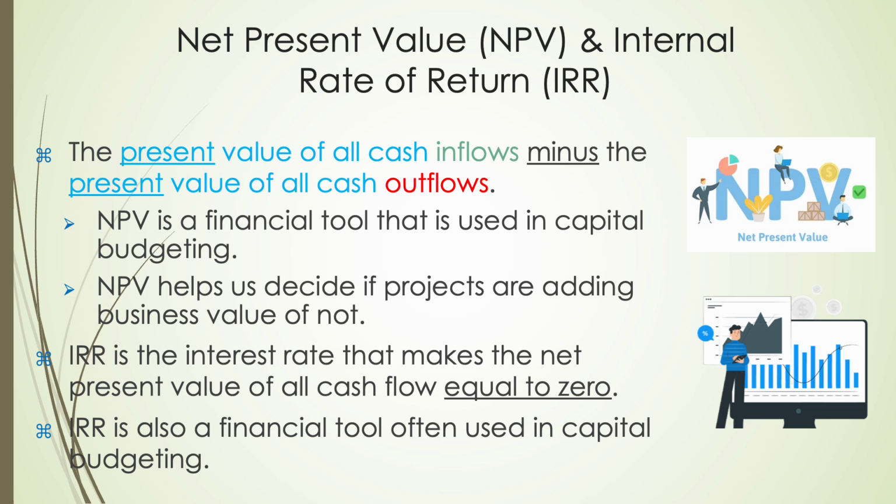When evaluating investments or projects, net present value is a key tool we use. NPV measures the difference between the present value of all cash inflows and the present value of all cash outflows over time. It helps us understand if a project will add value to the business based on today's dollar value. A positive NPV means the project is expected to generate more value than it costs, making it a good investment. A negative NPV suggests a loss, and typically the project would be rejected. Simply put, NPV tells us if the money we invest today will grow into something worth more in the future.